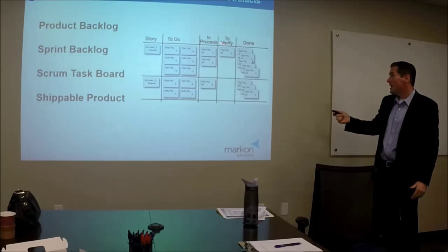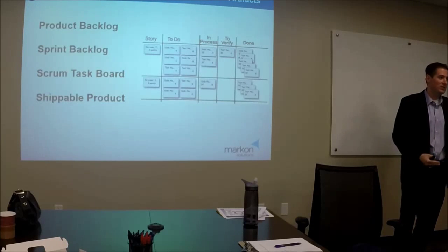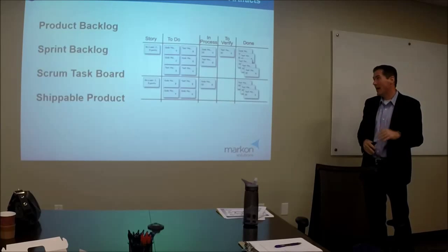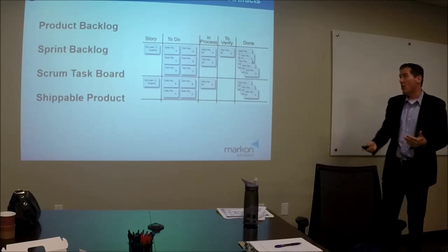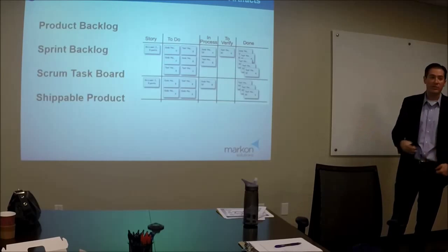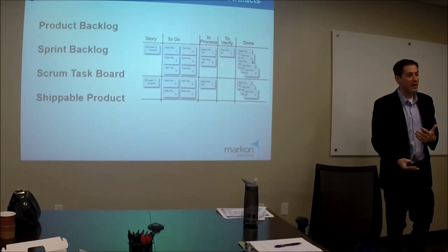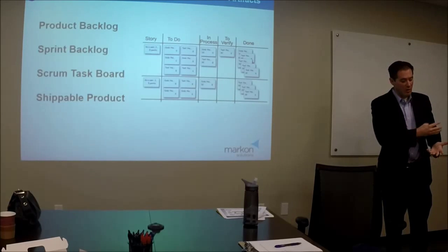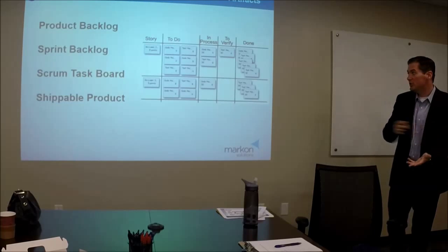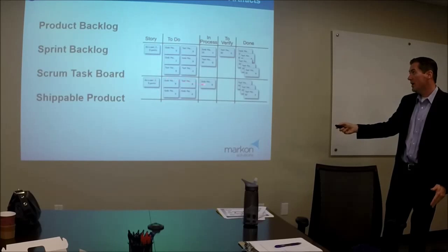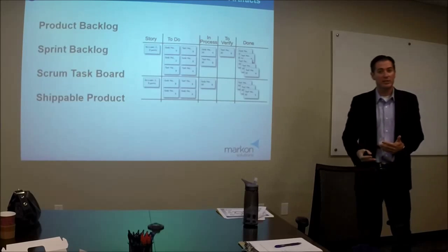These guys here have said, this is doing, they're in process, and they said verify. A lot of software teams will set up a column that says test. You could put some other columns. If there's certain people that do the verification for you before you mark something as finished, maybe you do want a verify column, that's okay. But the key core concept is to do, doing, done. You should see work flow through that board. It starts as a story, it goes through the board, it gets marked as done.